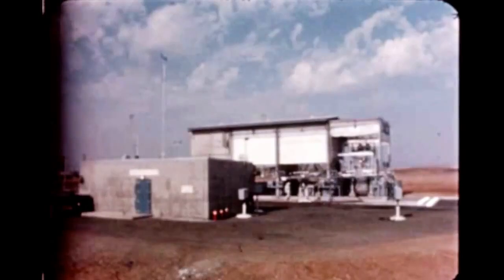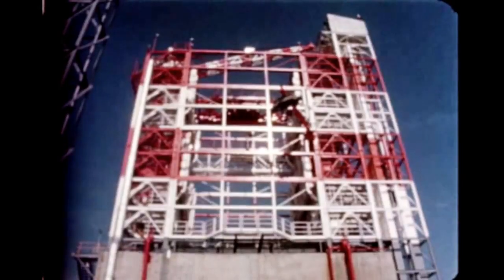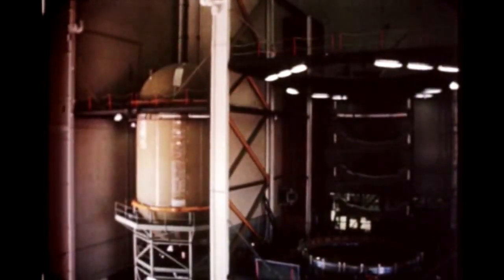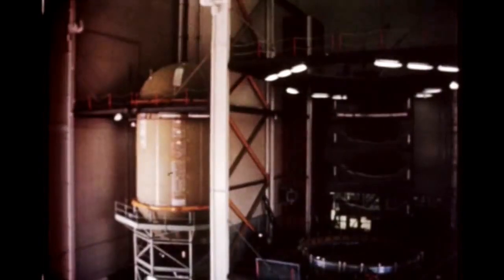At SACTO's Gamma Complex, a series of single and multiple attitude control engines' first phase development firings was successfully conducted in October. Also at Sacramento, Douglas continued installation of ground support equipment and necessary instrumentation on Beta Test Stand number 3. When the stand is completed, the S-4B facilities checkout stage will be installed for propellant loading tests scheduled to start in early March. Cleaning and installation of the facilities checkout stage at Huntington Beach is now complete. Douglas will use the stage for facilities checkout at Cape Kennedy after propellant loading tests.